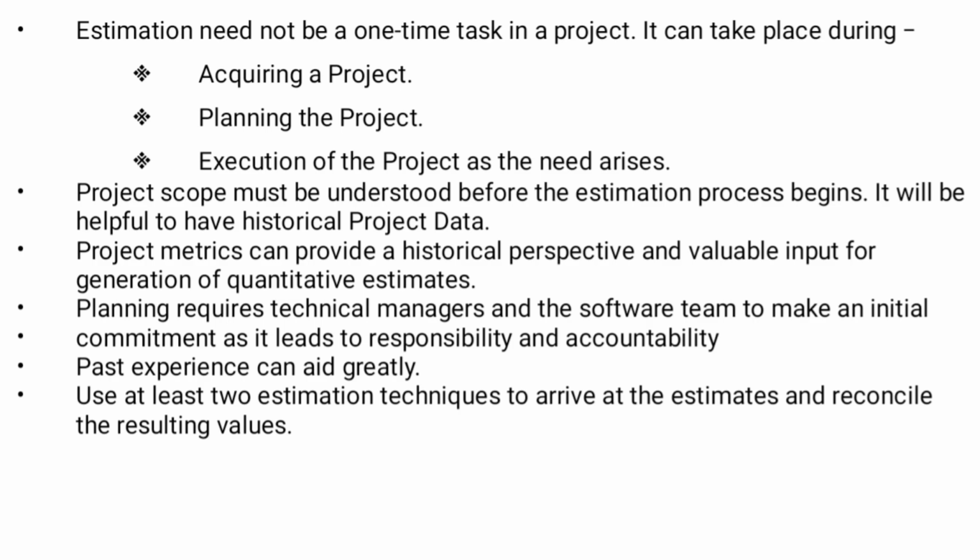Then estimation need not be a one-time task in a project. It can take place during acquiring a project, planning the project, execution of the project. Project scope must be understood before the estimation process begins. It will be helpful to have historical project data. Project metrics can provide a historical perspective and valuable inputs for generation of quantitative estimates.